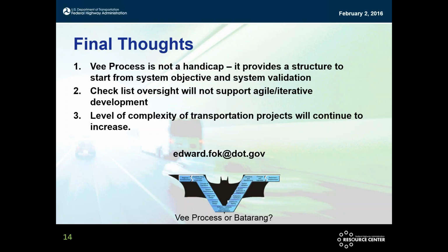I want to know what process you plan to go into, what the decision gates are on making certain decisions on how the project gets deployed, and how changes are going to be managed. So I want to see that. And usually when I review this stuff, I look for a sign that it's boilerplate, where basically you take a boilerplate document and search and replace. I usually send that back.